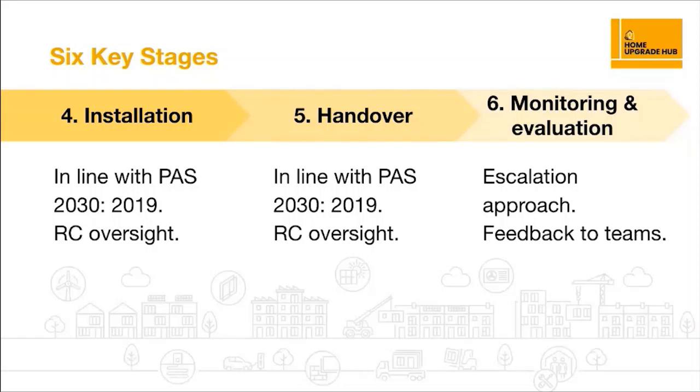So they need to be supported to understand what things have been put in place and how to get the best out of them. And then the final stage, but by no means last in importance, is monitoring and evaluation. It's really important, and all homes will have to do a basic level of evaluation. And this is really important because it allows not only defects to be identified early, and so we can hopefully minimise that performance gap that we talked about, but it also is crucial for feeding back that learning to professional teams, so this idea that we get a kind of feedback loop going.